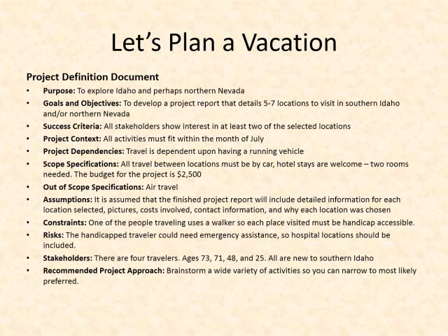is that it's not up to you either to make sure that I have a running vehicle, and it's not up to you to make sure that I know where car repair places are located. That's outside your scope. Then we get into the assumptions, and this is an item that you'll use to market your finished product to me.